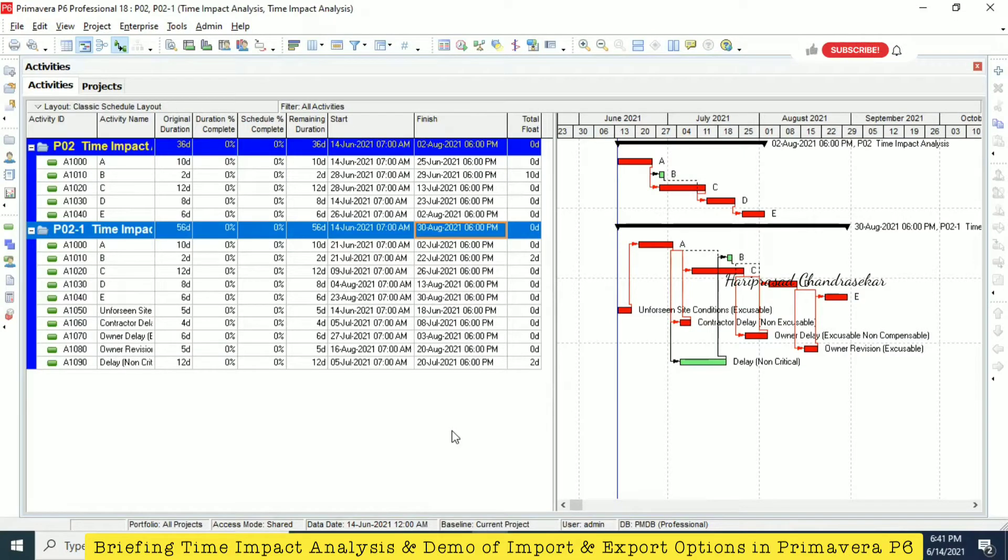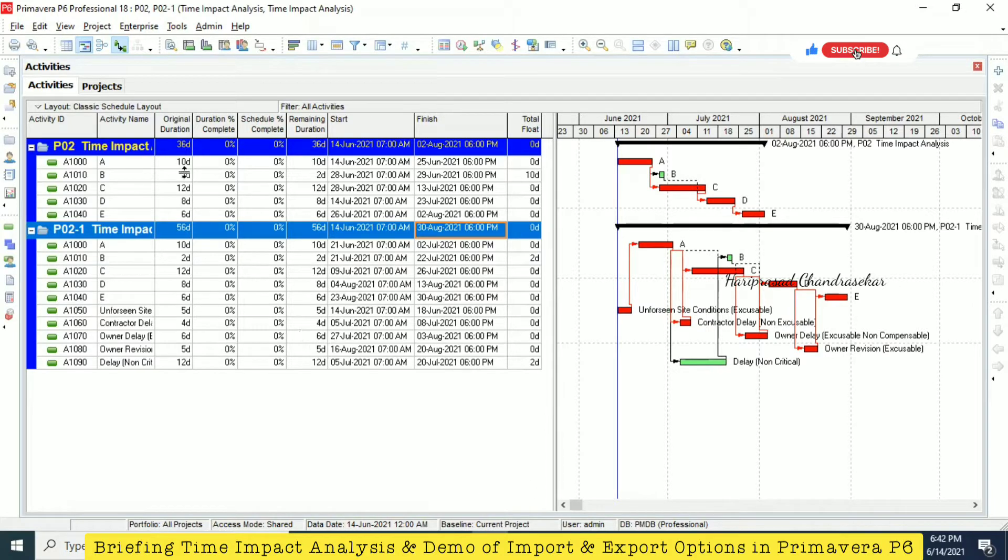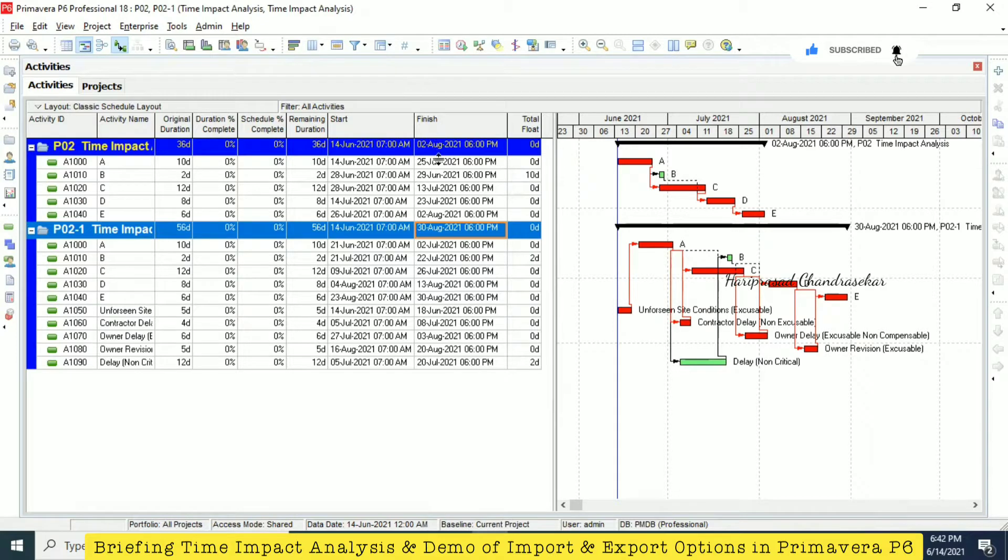I just made one example for time impact analysis today. We can compare two different things, like we can see the finish dates. As per the delays, now we are getting like 20 day differences.